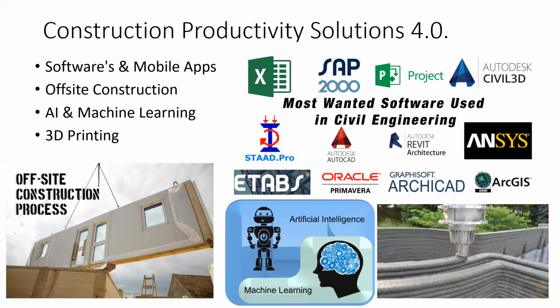Robots and artificial intelligence are also being used to monitor job site progress with real time, actionable data to improve job site productivity. Autonomous drones and rovers are equipped with high definition cameras and lidars to photograph and scan the construction site each day with pinpoint accuracy. Artificial intelligence then uses those scans to compare against your building information modeling models, 3D drawings, construction schedules, and estimates to inspect the quality of work performed and determine how much progress has been made each day.